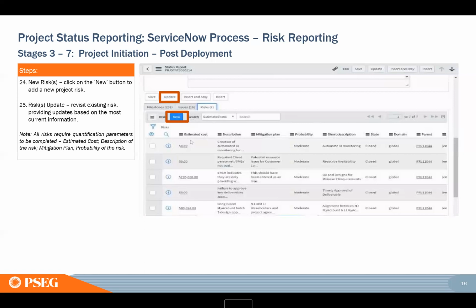You should be thinking about what could go wrong in your project, at least weekly, and getting that documented. Going into 2022, another item they have on the list is starting to do risk reporting compliance. The ops team is going to start looking at who's actually updating their risk and doing quantitative risk assessments and really managing their risk.